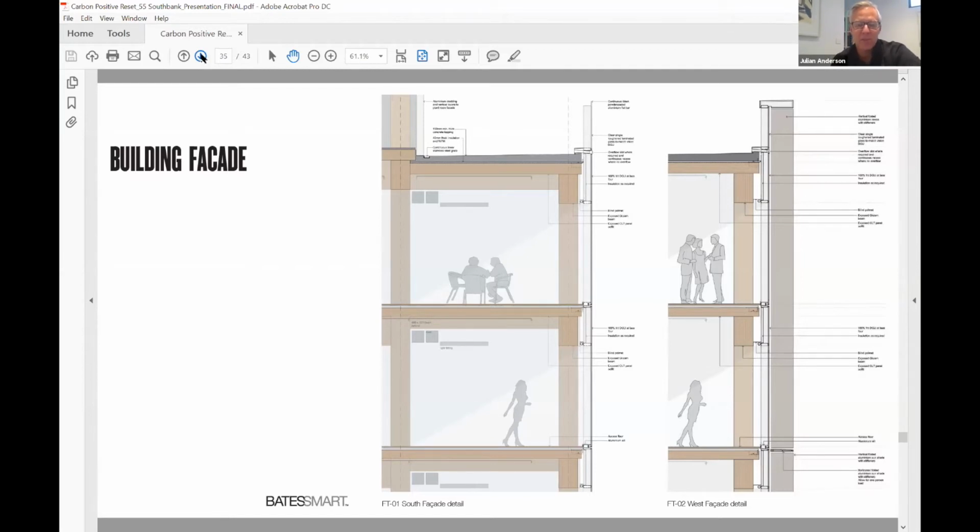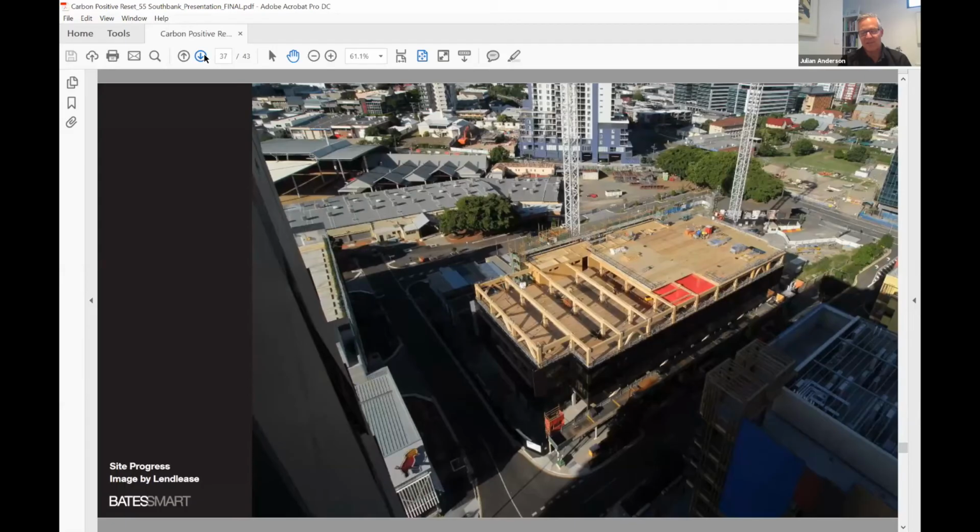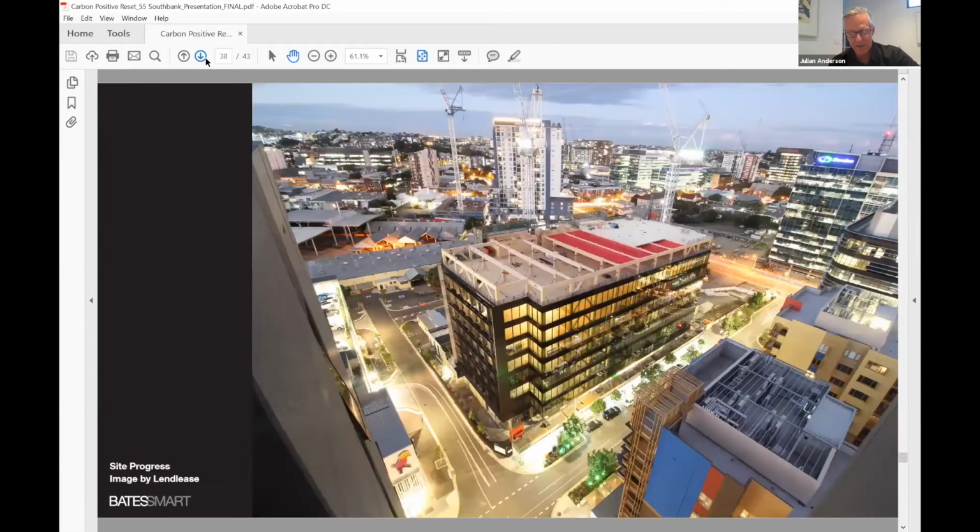This is our lobby, so we were keen to complement the timber by bringing greenery into the space, and then some construction shots. It's like a giant timber Lego project with a huge amount of accuracy and precision arising from off-site fabrication, and typically not more than about 6 people on site putting these panels, columns and beams in place at a time, which contributes to a very clean site, very efficient and very, very safe.